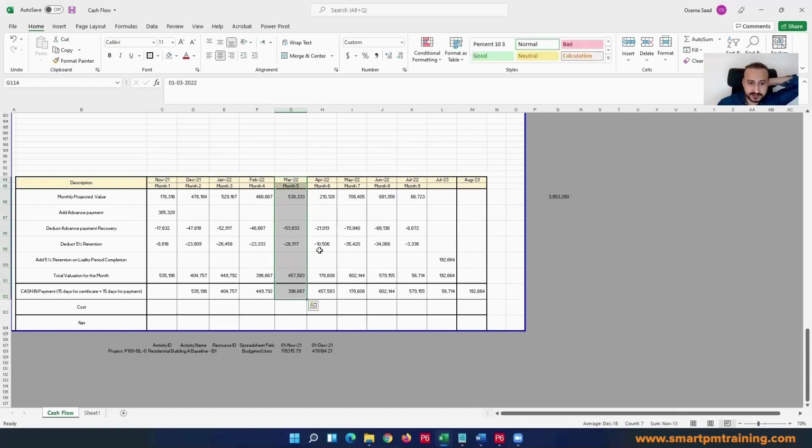However, cost-wise, like what is going out from your bank account, you think it might cover you, but in some cases, you want to place the order of the equipment maybe 3 months before, because you have to place the LPO and submit guarantees, right? And stuff like that. So you get a lot of money here, but you pay a lot of money during this time. And that's how we can measure the cost now, like the negative. I'm not talking about profit right now or anything like that. I'm talking about what's going out from the bank account and what is getting there in the bank account.